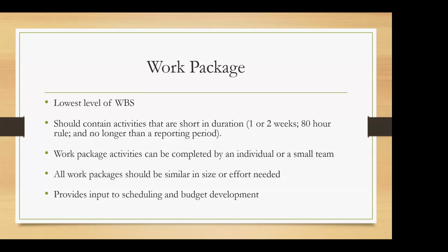It should not be longer than the usual reporting period. Work package activities should be able to be completed by one person or a very small team of maybe 2 or 3 people. All the work packages should be similar in size or similar in effort.